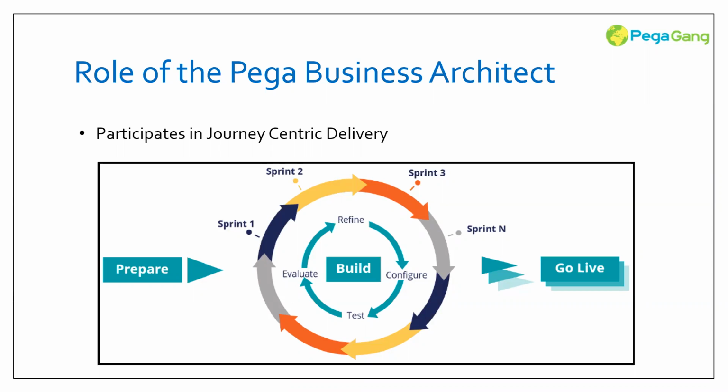Coming to the next phase, once the MLP has been fixed, we move into the build phase, where the project teams and the sponsors will review the application, the goals, and the approach for how we are going to develop that application. We'll be defining that, and then we start refining the backlog items. We call this a grooming session. In this grooming session, from the backlog, we pick up a few of the user stories which are prioritized, and we start refining them, and we set up the project to perform certain activities. This everything happens within the build phase.